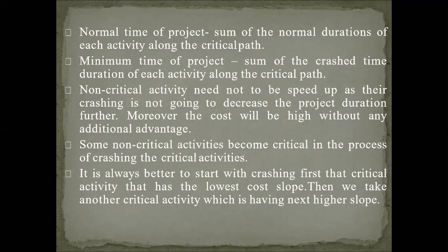Then it is always better to start crashing first the critical activity that has the lowest cost slope. If one activity increases cost by 200 rupees per day, and another activity increases by 400 rupees per day, then we have to go first for the 200 rupees per day activity, not for the 400 rupees per day activity.